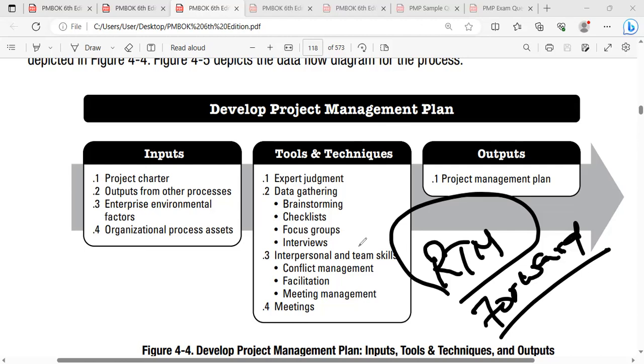So this shows that you asked us to remove this, or modify it, or change it, because you never understood the project at the early stage. So you said that you had given a wrong requirement. Can you pull that requirement from the requirement traceability and modify it? You gave this, sir. So we have clear tracking and tracing information. So RTM will be used to give the complete tracking and tracing. So you are able to track and trace from the requirement stage until the deliverable stage. Or if you want to track and trace from the deliverable back to the requirements, that traceability is called backward traceability.